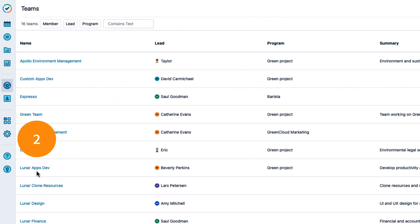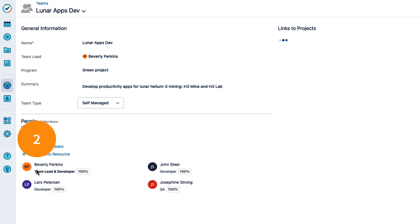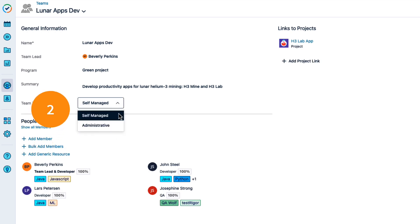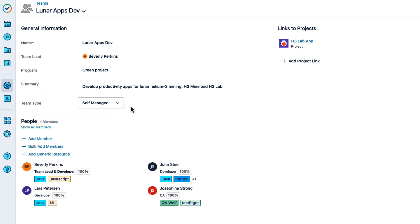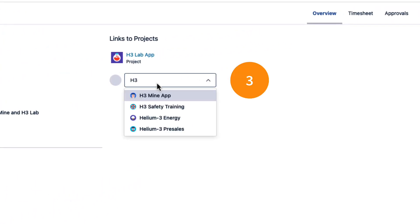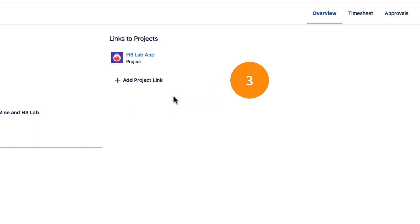Step 2: Check that each team is set to self-managed. This makes the team available for team planning. Step 3: Link each team to the Jira projects that they're working on. This makes the team available in the Tempo Team field in the issues in those projects.